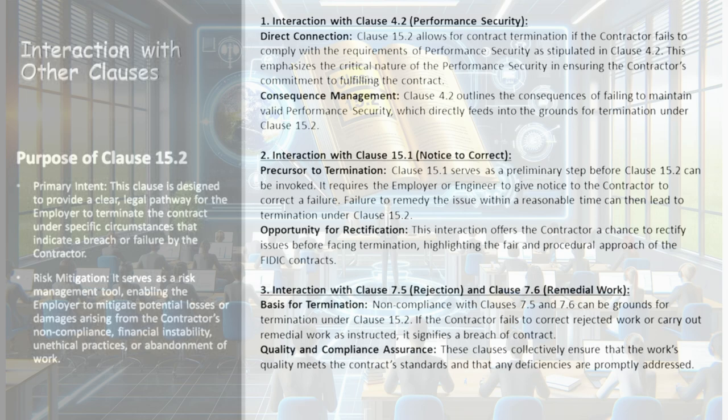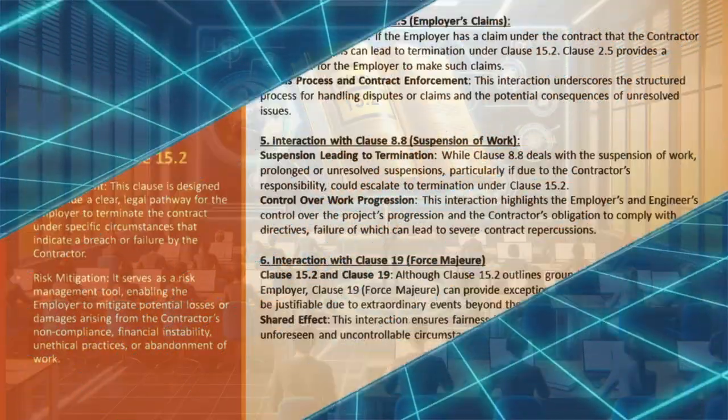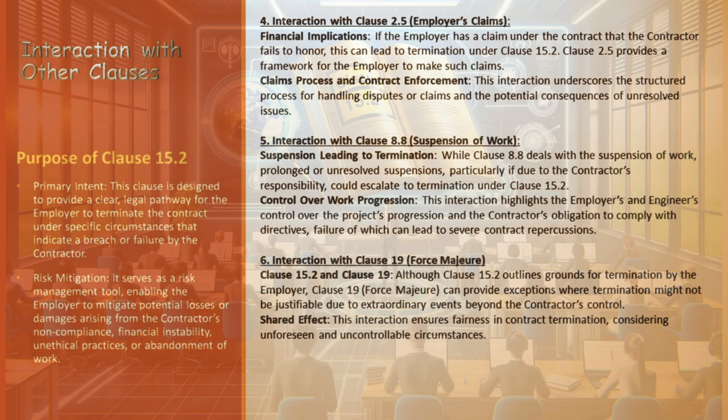Interaction with Clause 7.5 (Rejection) and Clause 7.6 (Remedial Work): Failure to comply with Clauses 7.5 and 7.6, which deal with rejection and remedial work, can constitute grounds for termination under Clause 15.2, highlighting the significance of contractual compliance. These clauses work in tandem to ensure adherence to the contract's quality standards and the prompt rectification of any deficiencies.